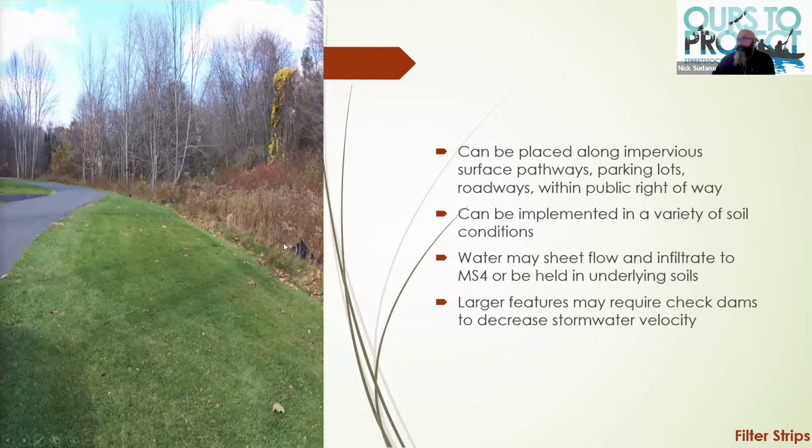And contractors, I would tell you that upon completion, remove your silt fencing, right? We don't want to see this here. Especially in Santa Rosa, we've got the tiger salamanders and wildlife corridors that we need to actually maintain along these streams and creeks. So just be mindful that when you leave the site, leave it so that this feature can actually function the way it was designed.